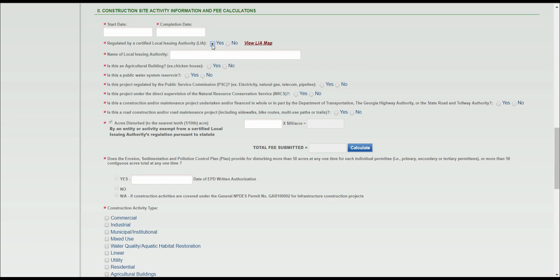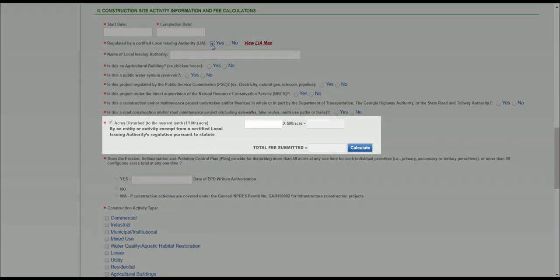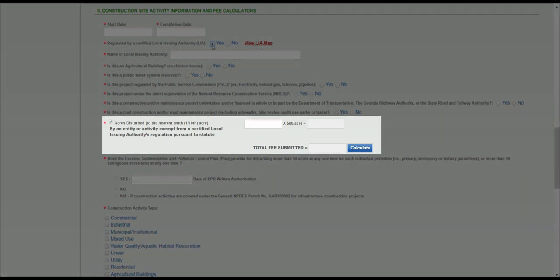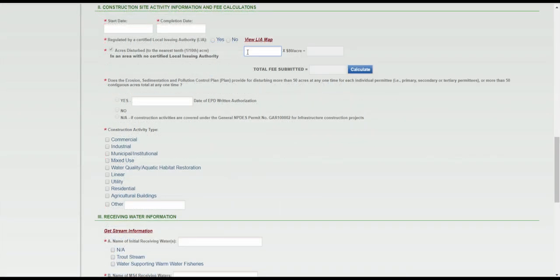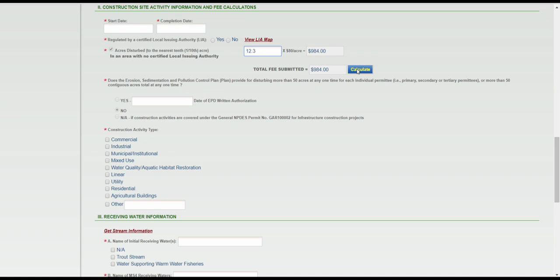The Fee is $40 an acre if the project is under the jurisdiction of a local issuing authority, and $80 an acre if there is no local issuing authority or the project does not fall under local issuing authority jurisdiction. Enter in the number of acres disturbed to the nearest one-tenth of an acre, and click Calculate. Please be aware that if you're filling out a secondary or tertiary submittal, you'll have to report the disturbed acreage to the nearest one-one-hundredth of an acre.